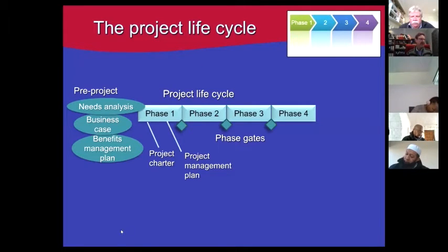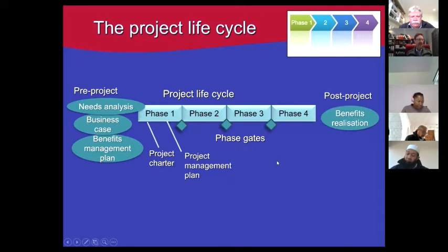And then from that, the project manager moves forwards and prepares the detailed project plans. The PMBOK refers to that as a document called the Project Management Plan. It's one document that comprises all your project plans: your scope, your schedule, your costs, budgets, resource planning, your quality management plan, and every other aspect of planning you've done. In post-project, we have benefits realization.